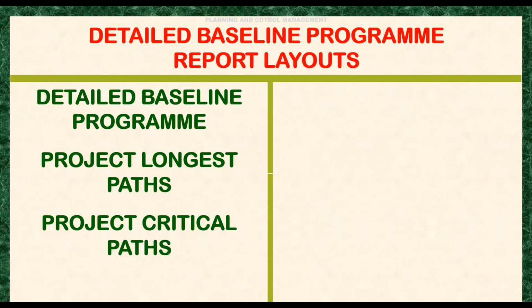And the next is the project critical path. It is the network of activities within the project with total float that falls behind the threshold or is less than 0. This may or may not be the longest path. There may be some confusion in mind for some about the difference between the project longest path and the project critical path. Let me explain quickly, in a simple way.